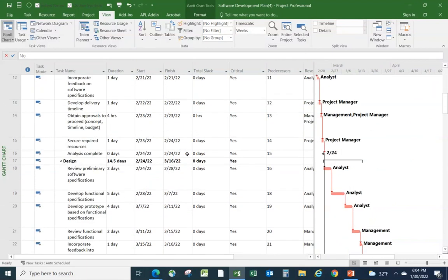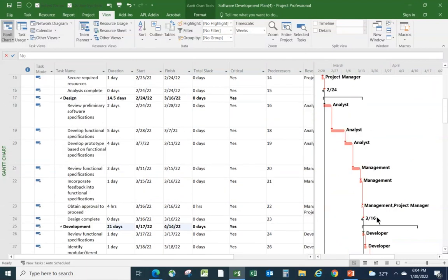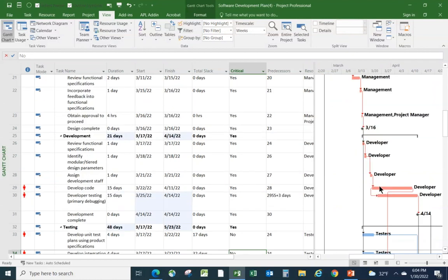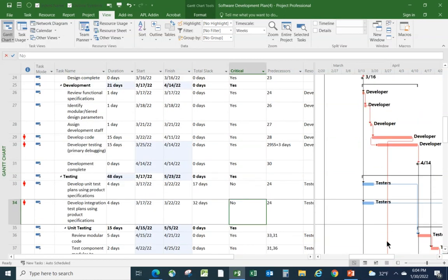But what you might have been noticing is that it's fine understanding what the critical path is over here, and it's important to know that. It's important to know which tasks, which, if they get delayed or their durations extend, will blow out the duration of the project. It's always important to know that. And by the way, as soon as you start adding a certain amount of time to some of these tasks, they might become critical down here. They might take over as critical tasks.